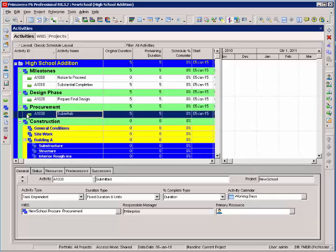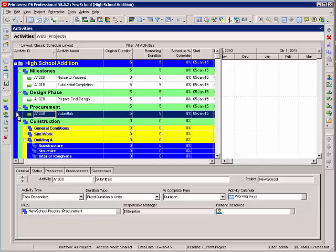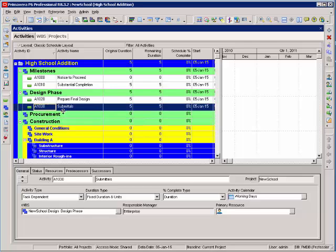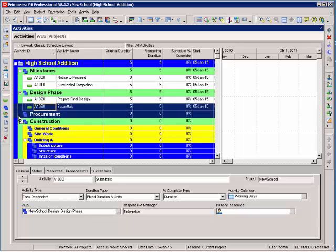Let me show you how you can move activities if you like. If you put an activity under the wrong heading, I move my mouse over to the left and you'll see I get a little box next to my mouse. I can click and drag an activity into a different heading and it will automatically change the WBS.